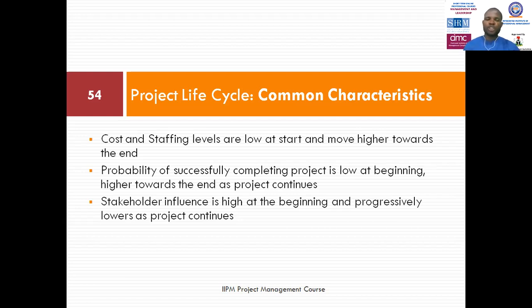But as we keep adjusting to changes and keep pushing towards the project, the possibility of success increases towards the end. Now, another important characteristic we have to note here is that stakeholders' influence is higher at the beginning and progressively lowers as the project continues. This is so because trust has not yet been built, and communications have not been defined, or perhaps have been defined, but operationally have not become efficient.